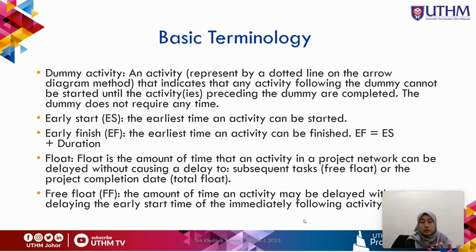Okay, and then you have float. Float is not an ice cream. Float is the amount of time an activity in the project can be delayed without any effect on the whole project duration, meaning that in some activities you might have clearance days that will not affect the other activities. Some activities, yes, you have the clearance, or you have the float.